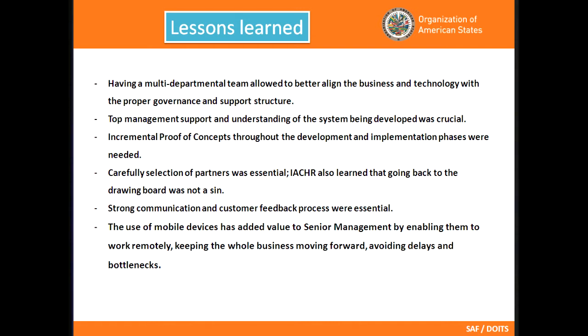And the first one is get your user involved from day one. We were outnumbered by the number of lawyers regarding the IT staff that were working with them. So what we did was we trained one of them. So we take one lawyer to the dark side, okay? And we trained them on our software development framework so that we were able to have one of our own with them. This really paid off because the gap was bridged in a very, very particular way. And having an excellent project manager that knows how to go from one side to the other was crucial.